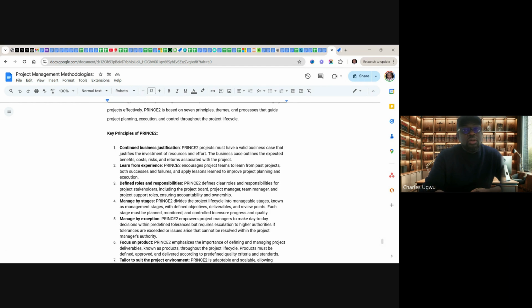The way we do it is that on the day we have the read meeting, we have the lessons learned meeting as well. So the read meeting can be 1 hour, and then lessons learned can be 30 minutes. So what we do after read, we start lessons learned immediately. So it can be just like 1 hour, 30 minutes. We capture read and we capture lessons learned. These are two different separate documents.